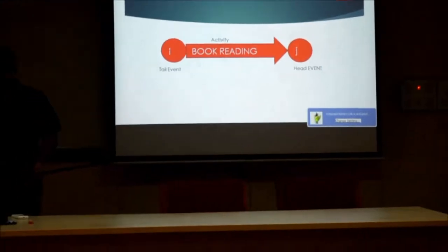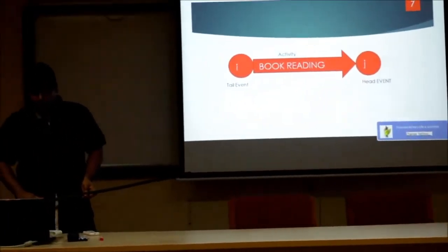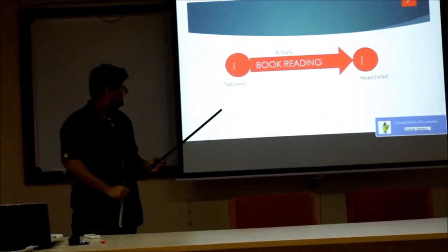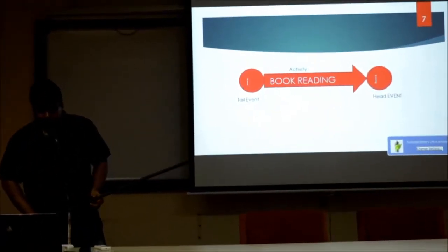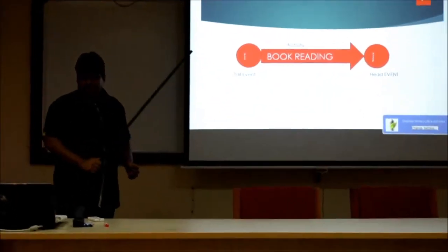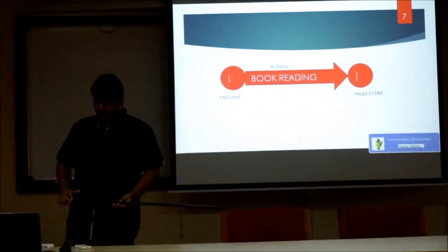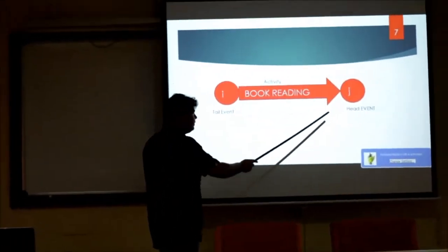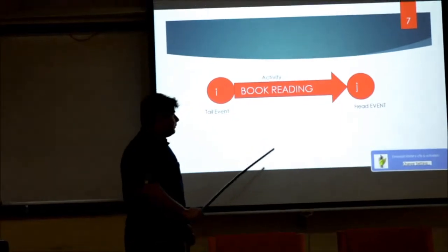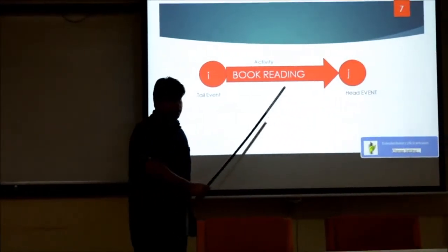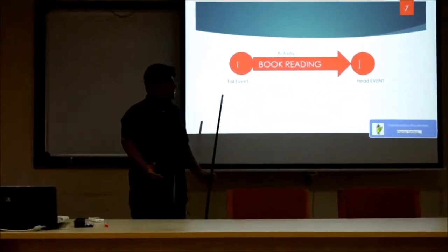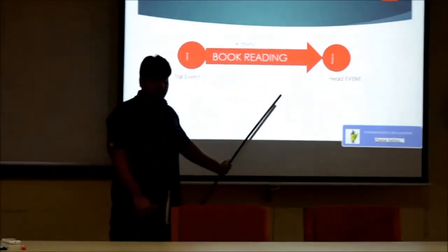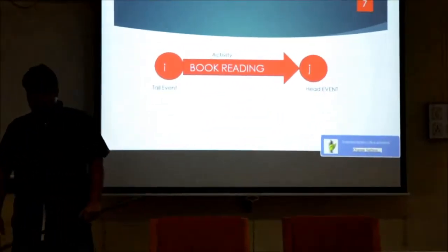So now we have to focus on events. What are events? An event denotes the point of time or accomplishment occurring at a moment, and it is used to represent the starting or the end point of the activity. It will not consume any time and resources for its completion. See, these are the events. They are not consuming any time. Like book reading, I started book reading. That is not consuming any time, and I finished the book reading. But reading the book takes time. That is the activity.